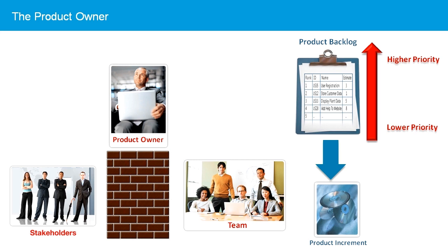Lastly, the product owner must make the hard choices on the project, constantly balancing competing interests. They must balance deadlines against the readiness of the product for release, and balance the interest of competing stakeholders when determining the priority ranking of each product backlog item. They must balance the need to demonstrate functionality in the product increment with the need to complete all the tasks in the user story before it can be declared done, to stem off technical debt. And they are the ones the Scrum team looks to as the final authority on what the user story is really asking for and what is the correct acceptance criteria.